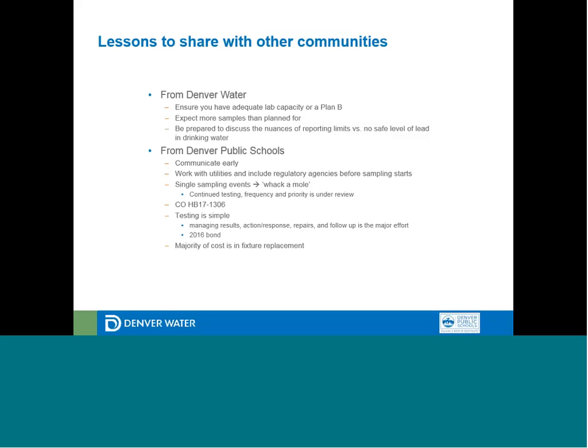We used some state-certified labs to try to make up the testing, and of course you can preserve these samples for quite a lengthy time, months. But the fact is, you've sampled in a school, let's say in November, and if you're not getting a result back till February, you're leaving the school district a bit in a lurch with communicating to their community about what has happened to that sample. So that is critical, and always expect more samples.